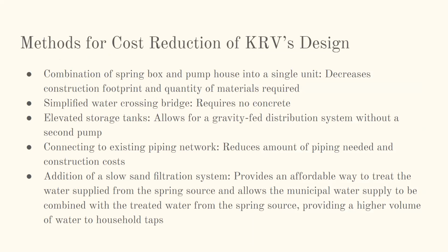So as this was a value engineering assessment, we kind of just needed to look at KRV's initial design and see how our design fell in with theirs and ultimately cut down on cost. So the combination of our spring box and pump house was a big way to decrease the ultimate footprint around the spring area, which cut down on the quantity of materials and the excavation and clearing needed of the area.